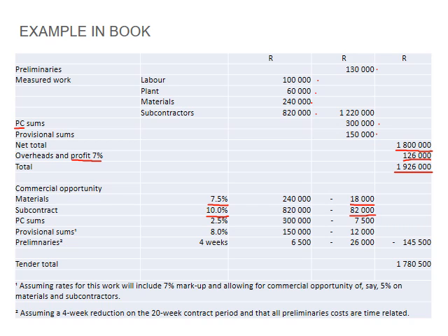to 82,000. You might also find at tender stage the guys will price, your subcontractors might price a little bit higher because they don't know the exact scope, but you anticipate as the scope gets clearer that they might give you a discount on the appointment, and you can actually negotiate a lower term with them. So you anticipate that, okay, I can maybe have a saving of 10% on this.